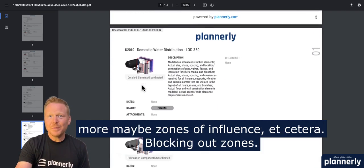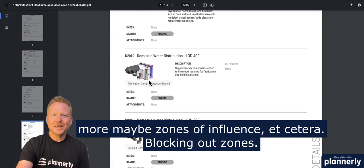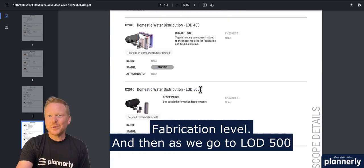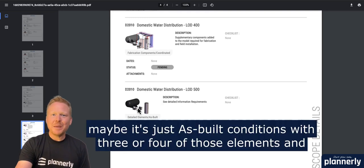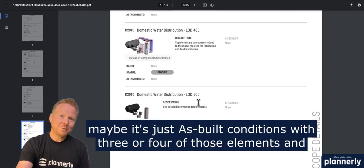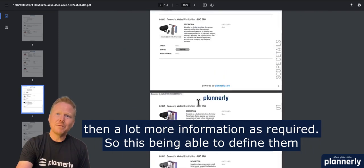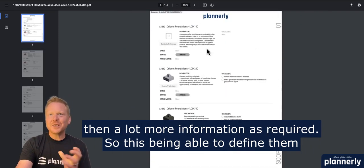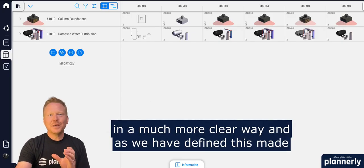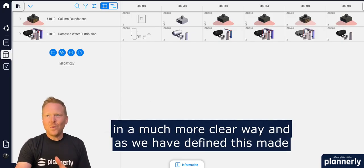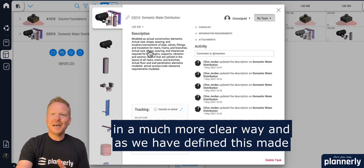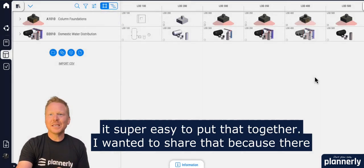We show examples going from just schematic diagrammatic to generic elements, to adding more elements, to adding zones of influence, blocking out zones, and fabrication level. Then as we go to 500, maybe it's just as-built conditions with three or four of those elements and then a lot more information as required — defining them in a much clearer way.